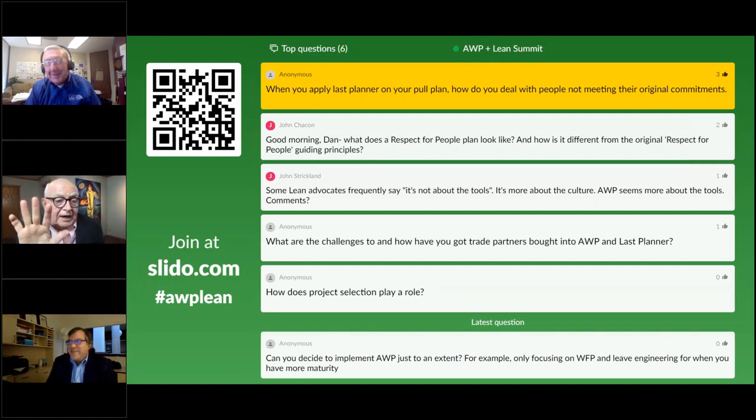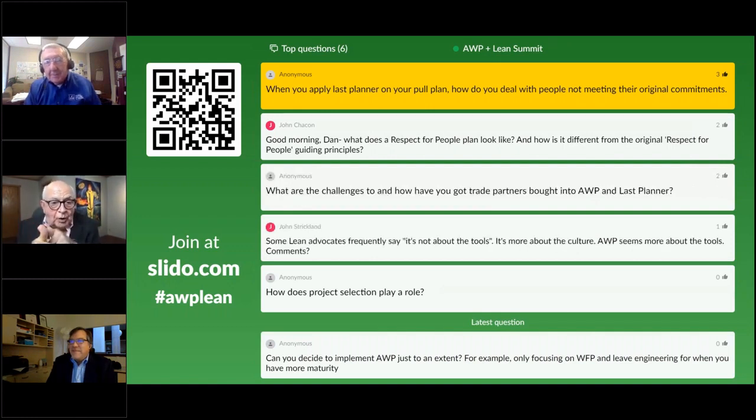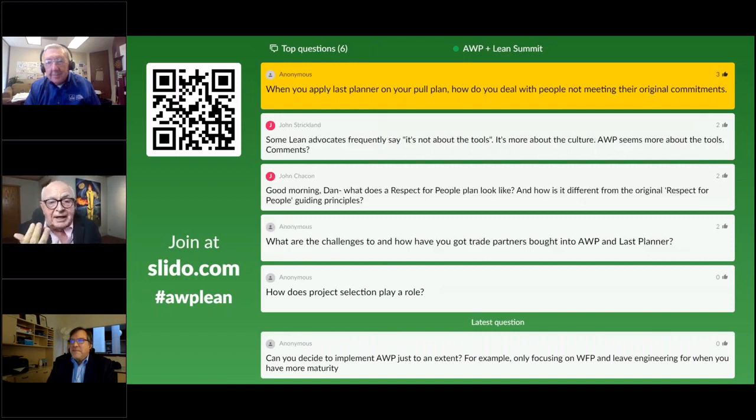What you do is you ask why five times. Why did you miss that commitment? Whatever answer you get, it's probably an excuse. So why that? And then why that? And then why that? And then why that? By the time you ask it five times, you've exhausted their BS meter, and they'll actually figure out the answer. And then that's what you go to work to fix.